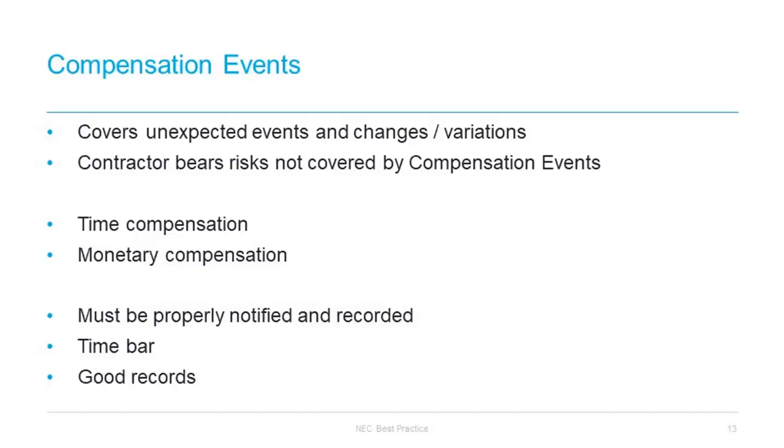People only includes those within the working areas and not any head office costs, because off-site overheads and profit are intended to be included in the fee percentage addition. And that is quite a common misunderstanding.